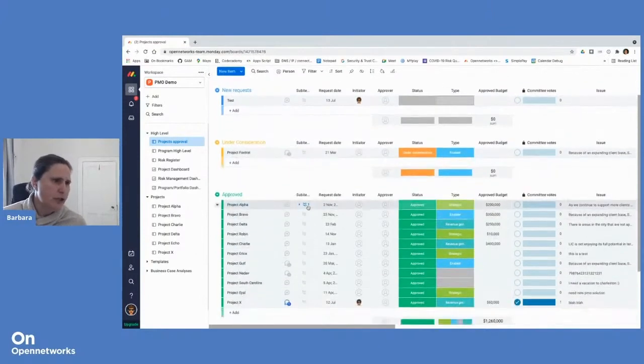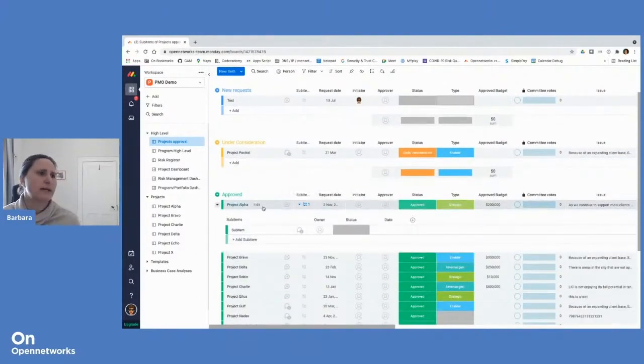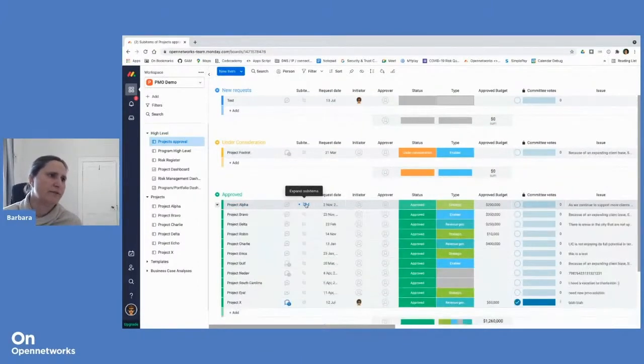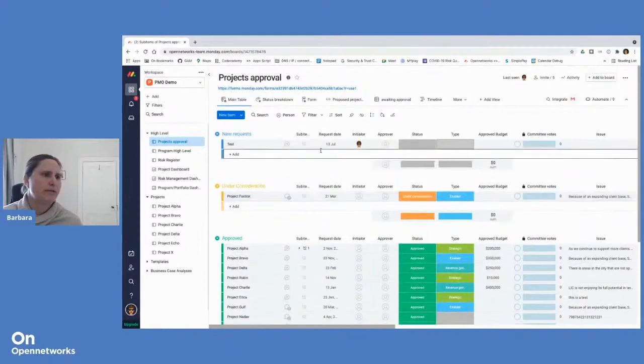Further dimension or component is sub items. So under each task or item, we can have multiple sub items and break down the task even further. And then views is the fifth component.